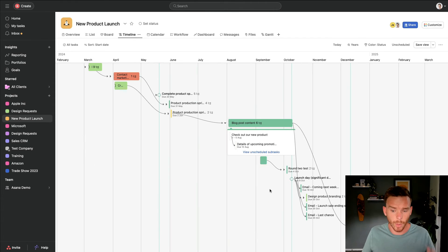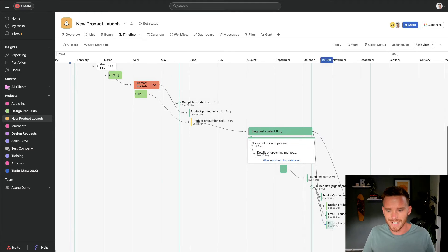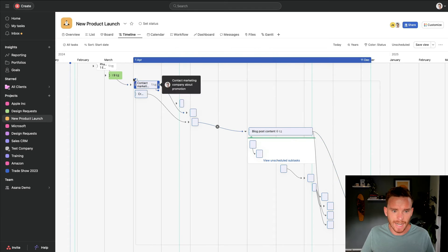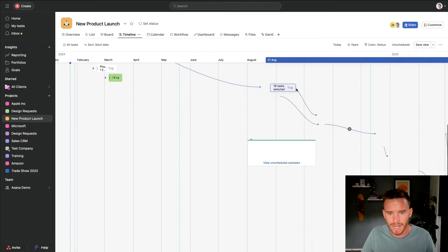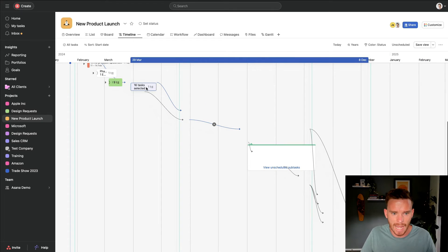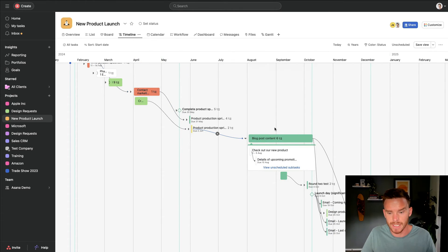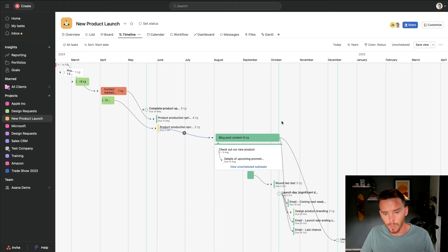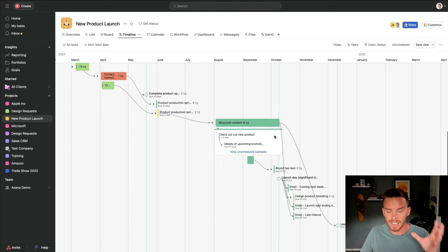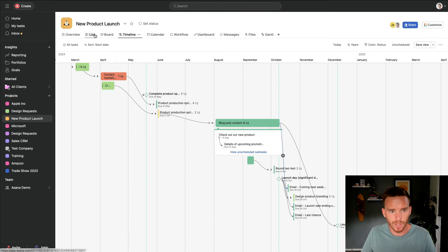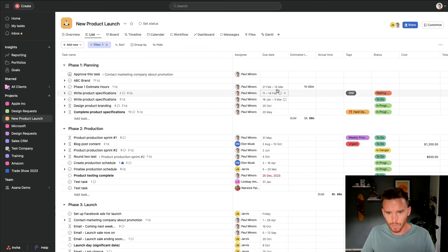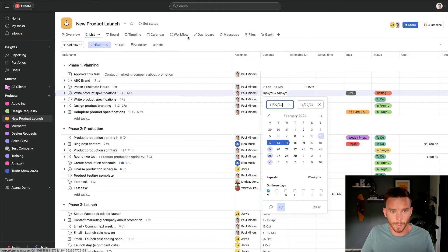While I'm on this topic, I also have the ability, which not a lot of people realize, to click and drag and select entire portions of tasks within the project. And I can drag them all at once. They don't actually have to have those dependencies. So if you are making a big adjustment to the project, it's much quicker and easier to do it here in the timeline compared to clicking through the list and trying to adjust each of these date fields one by one.